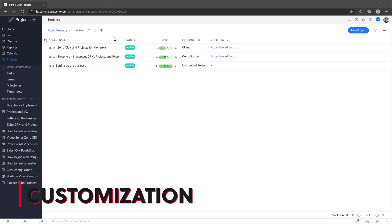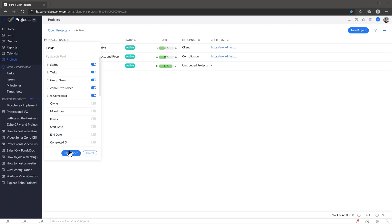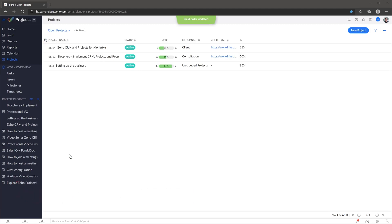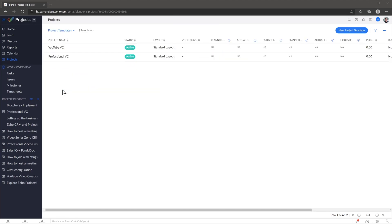Let's go over customizations. Zoho Projects has a lot of customization features built in. As I mentioned before, you can customize the views to fit your needs. You can also create project templates that you can use to create projects really fast, copying all the information from the template, including the list of tasks.